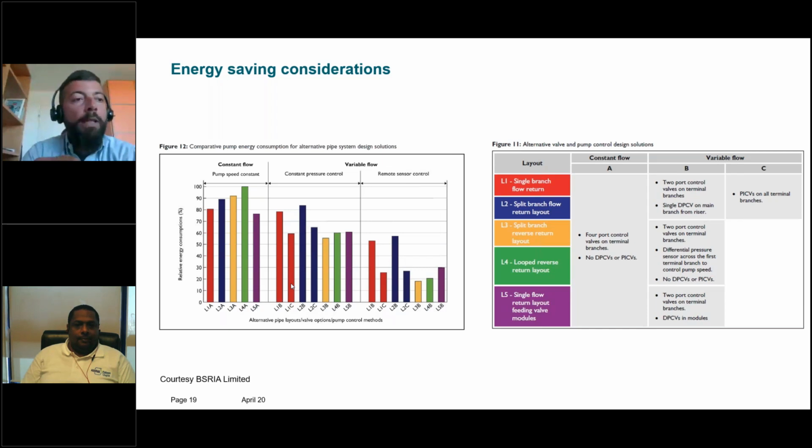So no, it is not commissioning free. You still have to go on site with mechanical PACVs. If you had a system with a complete intelligent valve, then maybe it is commissioning free, so you can do everything remotely. At Siemens, for mechanical PSEV, we also have a way to do remote commissioning. But this is not standard in the industry. This is just a specific solution.